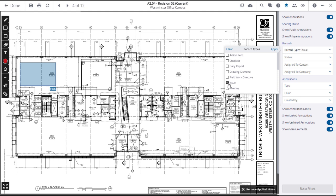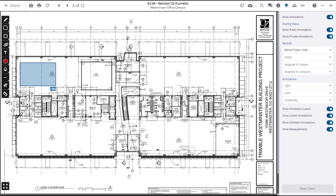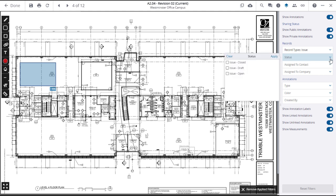When you have made your selections, click Apply. You can select one or more record types and statuses to appear on the drawing. For instance, you can use this filter to show only open issues.